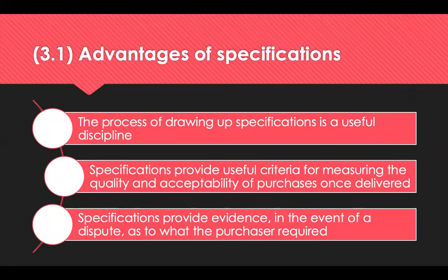So here are some of the issues relating to contracts that help us understand the importance of specifications. Now, contract law requires suppliers to conform to any specification or requirement that's included in the contract. And it must be supplied as satisfactory quality and fit for purpose. If you can take a few minutes to research a UK law case, it's Moore versus Landover of 1927. This will help you to understand the advantages of the specification.